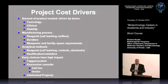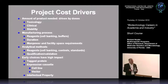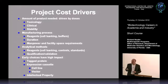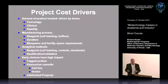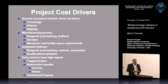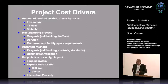The main project cost drivers are the amount of product needed, which is driven by doses, how you put it into vials, and how many vials you need for toxicology, clinical, and stability studies. The manufacturing process is a major driver, as are reagents such as cell banks and buffers. The major costs are really manpower. Early choices have a very major impact — fast and easy choices usually equal slow outcomes.